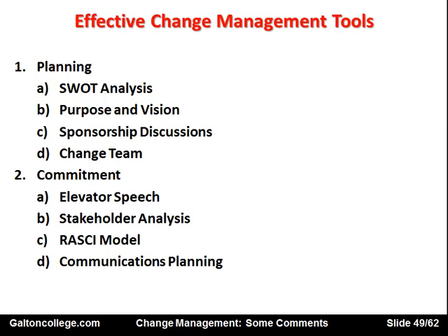Communications planning. Make sure that the communications networks are well oiled, that they're working well and people know where to get information. Whatever the culture of the business is, maybe information is put on a notice board, or it may be that there are weekly meetings, or there is a works committee, or that the line managers keep the workers up to date by taking time to explain what the company is doing and what the issues are and so on.